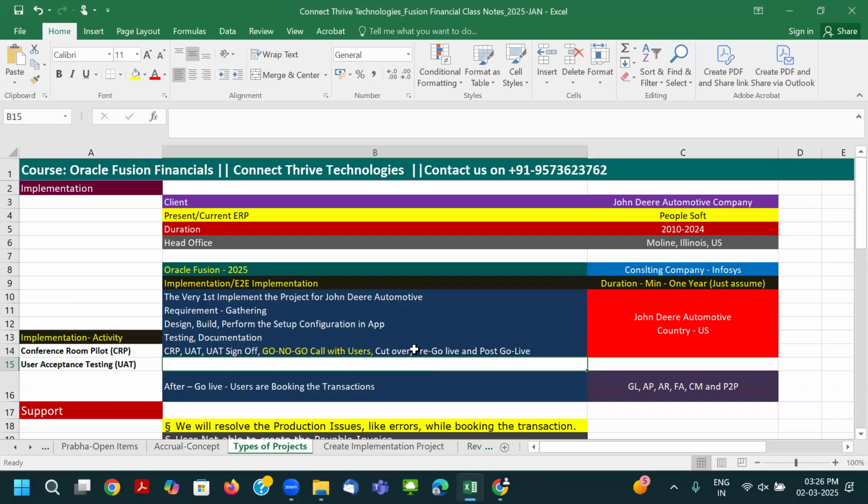Now we will prepare the cutover strategy plan. The cutover strategy plan means we have all the module-related configuration: who is responsible for which task, from which country, and in what time zone they will complete that activity. We have an individual task-based plan to configure the data so that we cannot miss a single setup in production, and we have a specified time frame. Then accordingly we will do the cutover activities, like doing the configuration in the production environment.